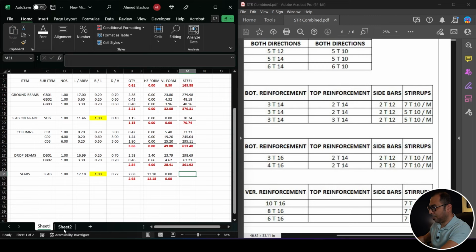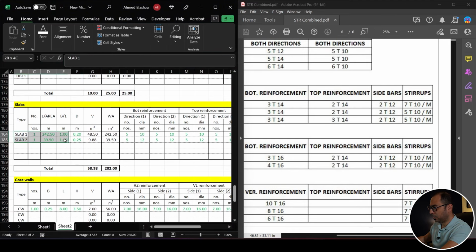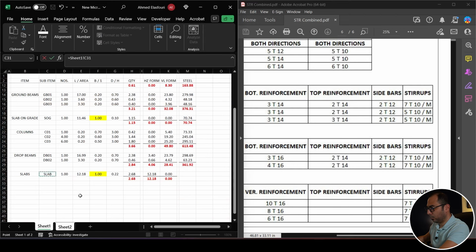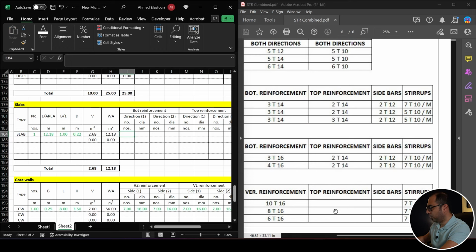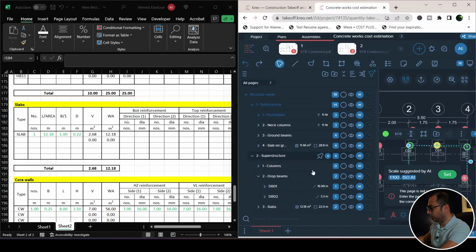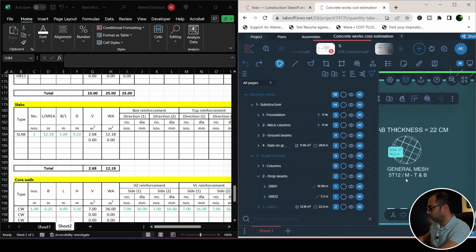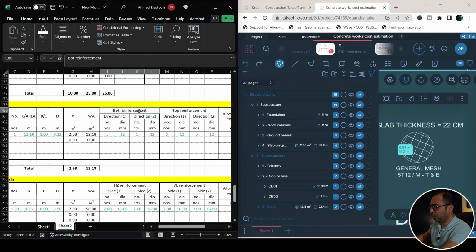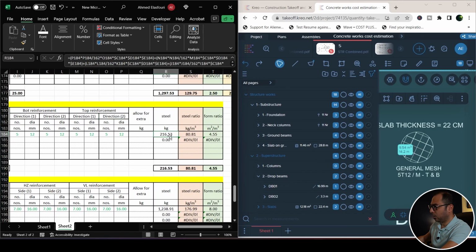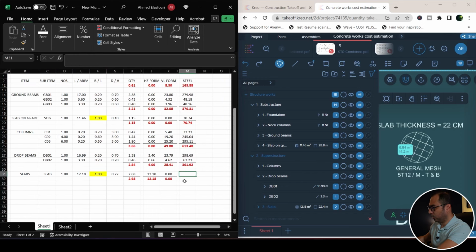Last part is the slab. So I locate the slabs here. These are the slabs equal to this. And I'll get the dimensions. Okay. And for the reinforcement, I have to go back to KREO actually to see the reinforcement. So the reinforcement here is 5T12 top and bottom. 5T12, 5T12, 5T12, and 5T12. Why four of them? We have bottom reinforcement, short direction and long direction, and for the top, short direction, long direction, and so on. So I am getting the steel quantity here as well, 216. So I'll say equal to